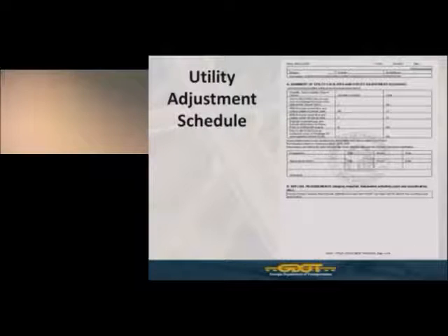The next line you notice says 4,000 feet of miscellaneous buried fiber and copper cables of various sizes. Quantity and conflict 90. So even though there's 4,000 feet within the limits of the project, there's only 90 in conflict. Now the next line says 6,500 feet of miscellaneous aerial fiber and copper cables of various sizes, and quantity in conflict is actually 0. So again, they've identified that they've got 6,500 feet of aerial facilities, but actually 0 is in conflict. But this is what we want to see in this Section A.